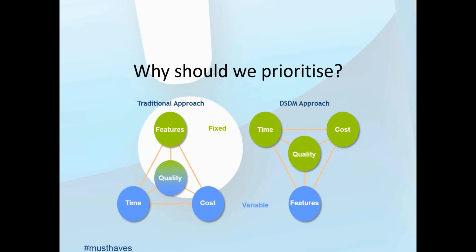So the point about time and cost is that if we try and hit deadlines, we get massive benefits from concentrating on time. The upsides are that we can plan, we can hit deadlines, we can hit market opportunities, we can cap cost. The upside of working in a time-focused way is enormous. But in order to do that, we have to prioritize. We're not too bothered about cost. We are a little bit, but really we'd rather hit the deadline and maybe go 5% over on the budget rather than be late and miss a market opportunity.